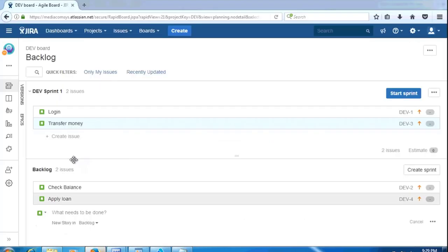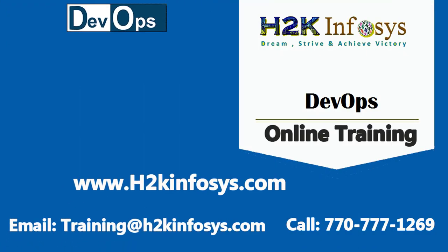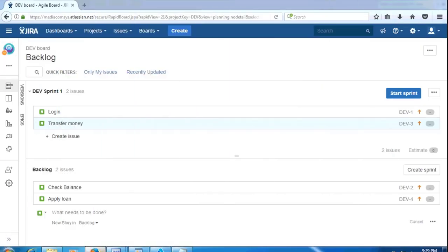For example, we are talking here about different user stories, right? Login and transfer menu. Typically, if you look at any project, you will get the login. That kind of functionality is relatively simple compared to the other functionality, right? So compared to the transfer menu, login is going to be simple. First, you are going to establish a benchmark: what it is going to take to finish the login story, the login use case. You come up with an estimate, you assign the story points for that story.